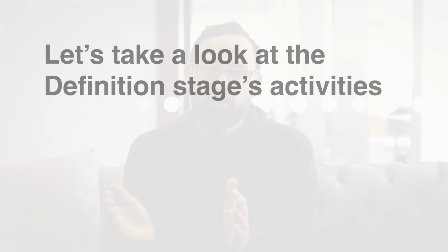So we're looking to de-risk any unknowns, choose any technology providers that we need to be able to build the product, choose who we're going to use for payment integration, what CRM we're going to integrate, any of those API or areas where the technical complexity where there might be some challenges, we try and bottom those out as part of this definition phase. And our ideal state is to be starting the next phase with all of the big risks taken off the table and a clear roadmap of what the product team needs to work on to take us through to launch.